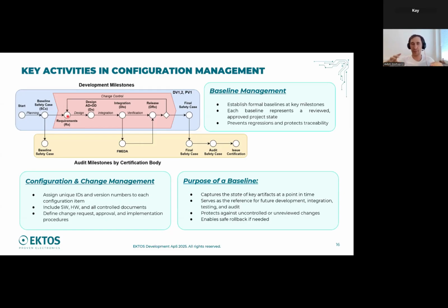all the changes of this library is configuration item and audit. Yeah, and also important thing is to plan configuration audits. If you split in some steps, in some activities, we have to confirm that we fulfill all the items we have to produce up to this milestone.